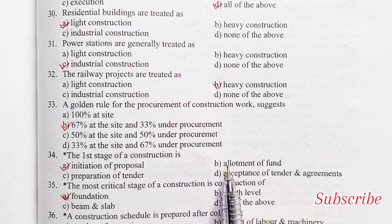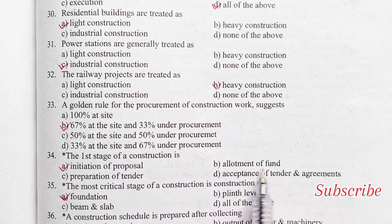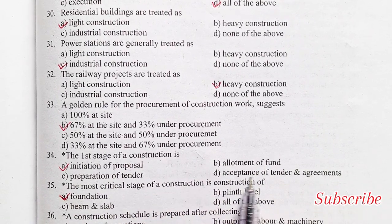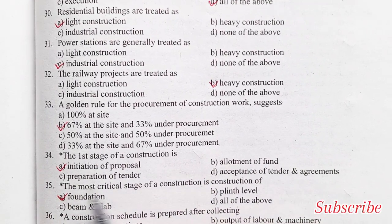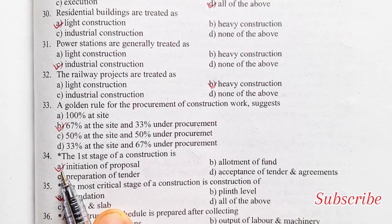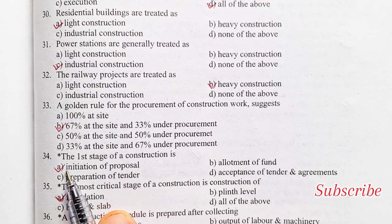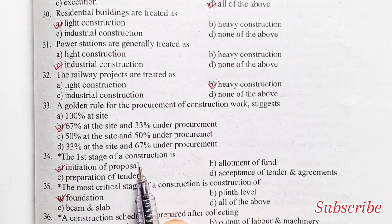The first stage of construction is: initiation of proposal, allotment of fund, preparation of tender, or acceptance of tender and agreement. Option A is the right answer — initiation of proposal.